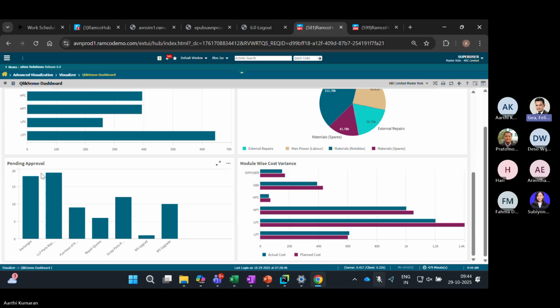So that is my spare parts. So spare parts it will track based on my availability. So what are the spare parts needed? What do I have? What is still pending to be purchased or pending to be received as well? So we include that to find out which of the tasks are getting delayed because of the spare part availability as well.